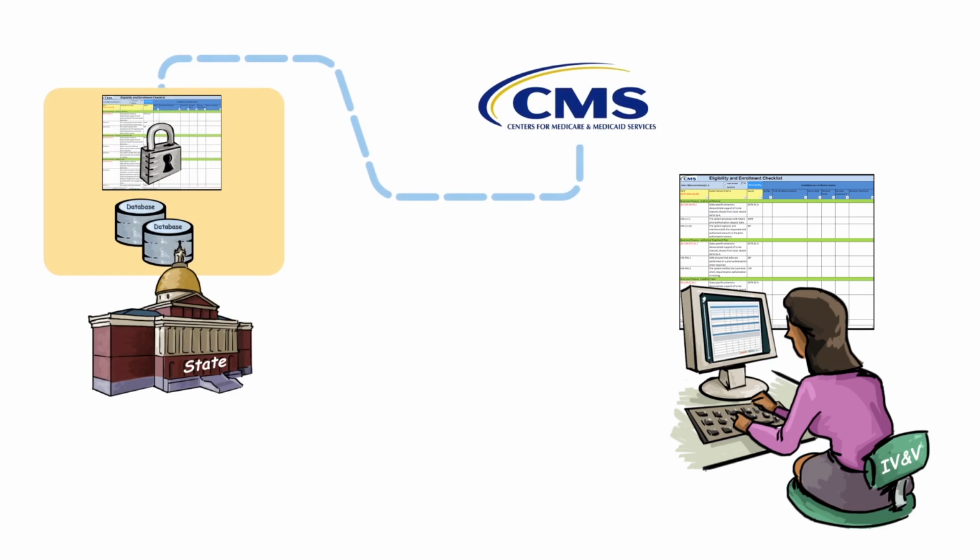When requesting a review, the state needs to ensure that the IV&V contractor has sent all completed checklists and the progress report. The state has granted CMS access to the checklist evidence and all artifacts for the milestone review. No reviews will be scheduled until these actions have been completed.